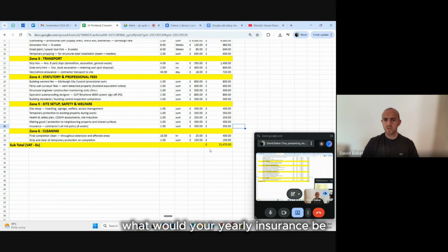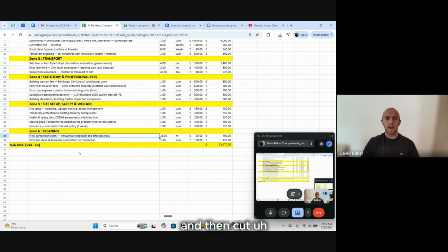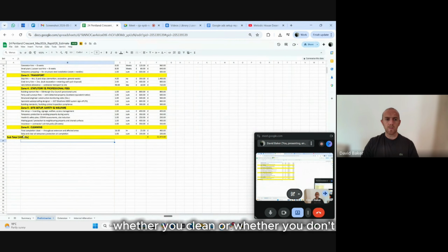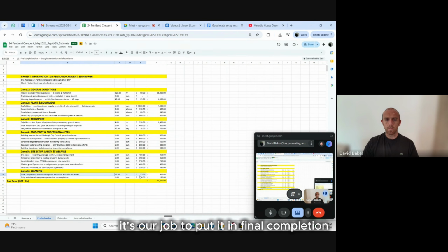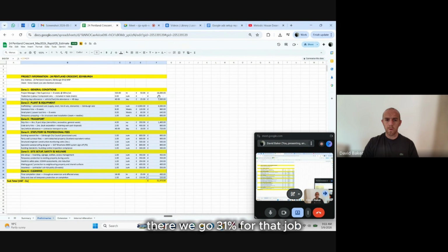What would your yearly insurance be? How long is this project? Divide that by the weeks, and then put that in by how many weeks you've got there, okay? And then final completion clean, whether you clean or whether you don't, it's our job to put it in. Final completion clean, strip and clear of all temporary protection on completion. There we go, 31% for that job.